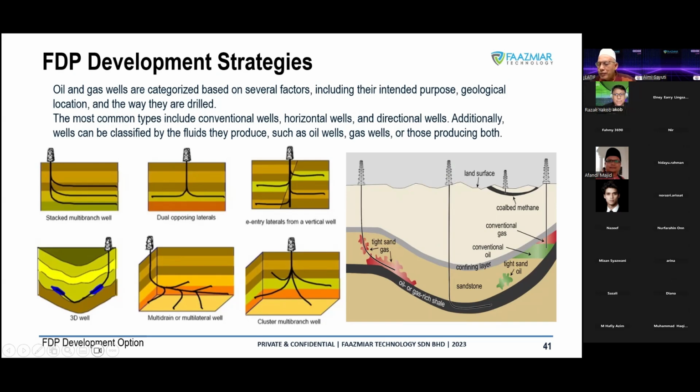In some areas you have coal bed methane. In Petronas, we have some share in Australia in coal bed methane, done by the local agent. We put a share there, and the methane here we produce. They drill so many wells across the zone and produce the methane. It's shallow. They can drill very fast, using a coil tubing rig with a hybrid rig. When I talked to one engineer, he mentioned that one well can take about 5 days. So 100 wells can take about 500 days, and divided by 3 rigs, they can do 100 wells for the coal bed methane in 1 year.